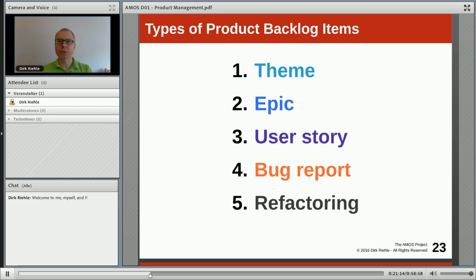A bug report is just that, a problem report with the software where some functionality or feature has been promised, but it's actually not working. You should capture all of your bug reports in your issue tracker, like GitHub Issues or Bugzilla or Jira. We use GitHub Issues. And you should then prioritize them, triage them, not in the bug tracker, but channel them through the product backlog. The reason for that is there's one place where all the work is and where it gets prioritized.